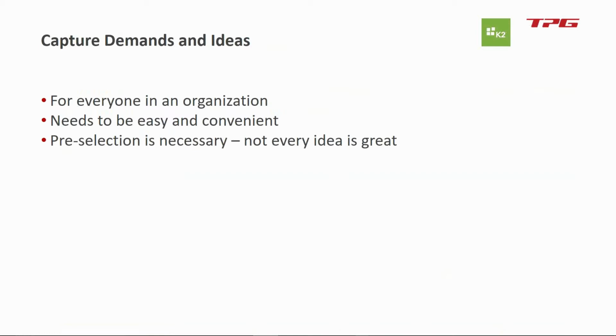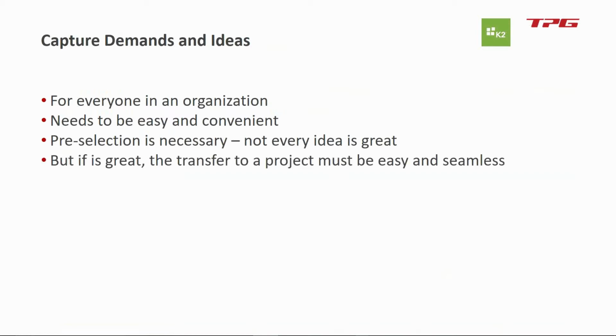A pre-selection definitely is necessary. So not every idea is great. And maybe this is the, let's say, first bullet point to remember why we are going to look into a solution that has idea management and capturing and project management and execution as two different ways of executing the same idea. And the very first step is, again, the capturing of the idea, that a pre-selection is usually necessary, and we don't want to have every idea as a new project in our portfolio. It doesn't make any sense. So the idea capturing is a pre-step, and after it's been selected, we will create the project automatically. This is what we're going to show today.